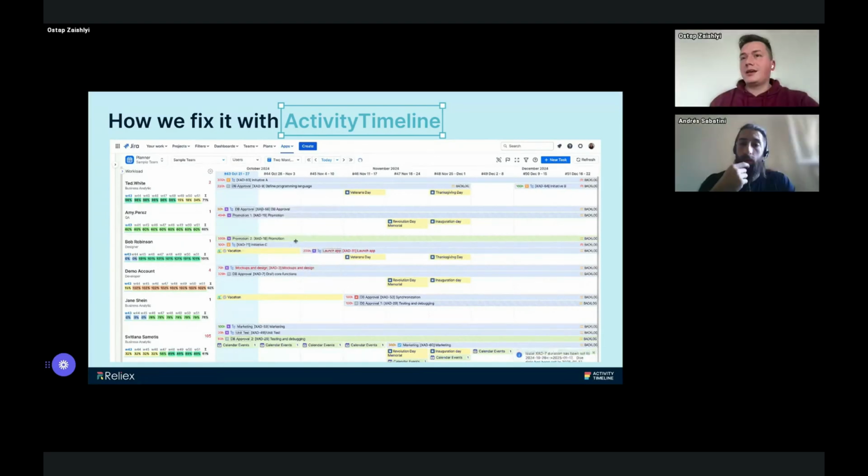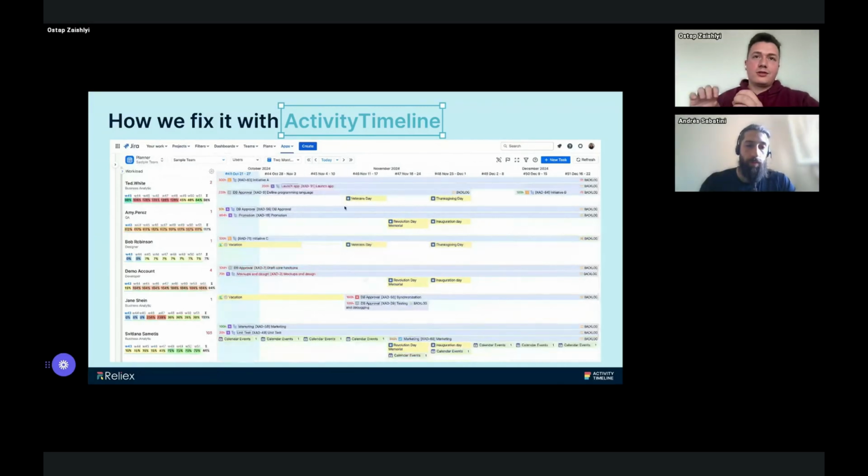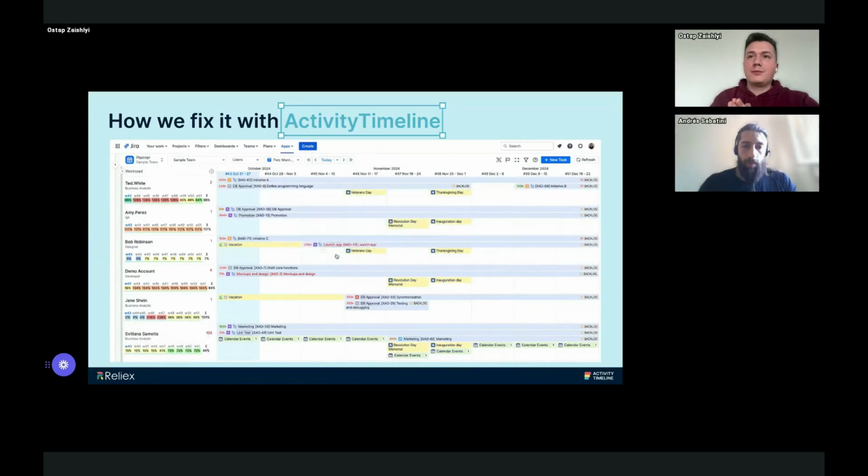So basically, you have big flexibility because you can split into a number of parts, and it can be between different assignees, and it also can be across different times of your schedule, because it's possible, for example, that one week you need to work 50% of your time on the task, but next week you need to work 100% of that task.